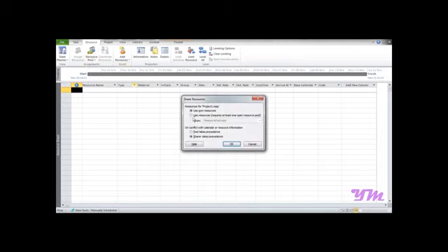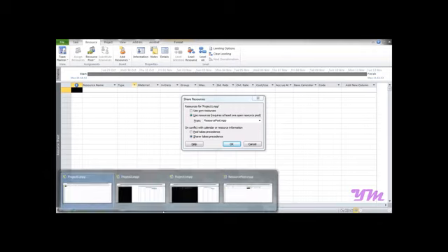But before doing this, please note to keep the file open that has the resources. For example, over here I have kept the file resource pool open, because if it's not open, it won't be displayed over here in this list. And then press OK. So you can see the resources have now been transferred into this new project.